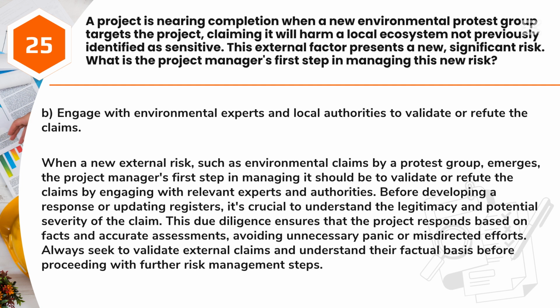When a new external risk, such as environmental claims by a protest group, emerges, the project manager's first step in managing it should be to validate or refute the claims by engaging with relevant experts and authorities. Before developing a response or updating registers, it's crucial to understand the legitimacy and potential severity of the claim. This due diligence ensures that the project responds based on facts and accurate assessments, avoiding unnecessary panic or misdirected efforts. Always seek to validate external claims and understand their factual basis before proceeding with further risk management steps.